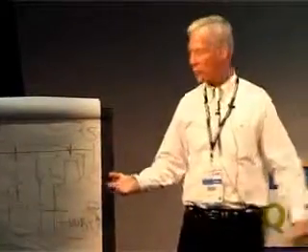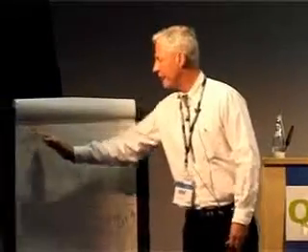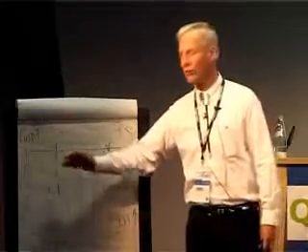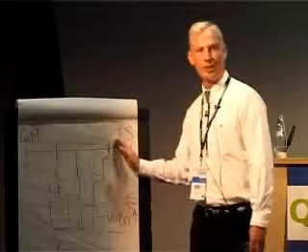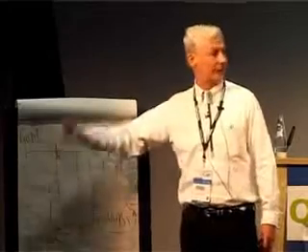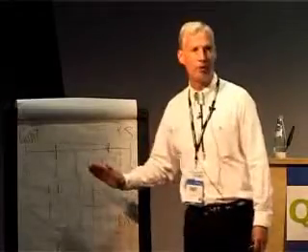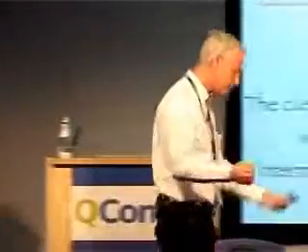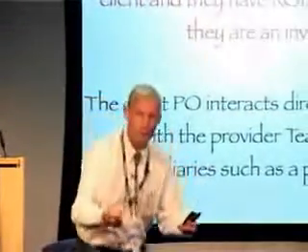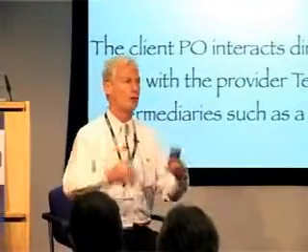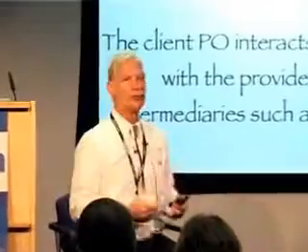And in Scrum, of course, now the customer is interacting directly every sprint and choosing the goals, the wish list for the outsourced teams every sprint, and then at the end of the sprint in the review, inspecting the results, and then adaptively planning what to do in the next sprint. So in Agile outsourced development, we give the steering wheel to the customer rather than handing over control to an outsourced project manager. So there's a dramatic change.